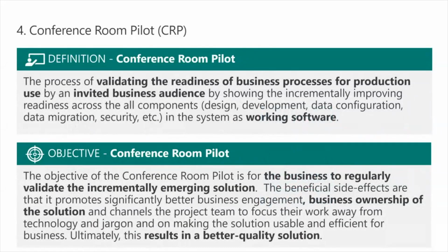Validating by the conference room pilot. This is a key step. And I've seen projects sometimes at the end of the sprint, especially if they're a little bit behind, think, oh, maybe I can skip the conference room pilot. I'll catch up with it in the next sprint. Don't do that. The sprint is not complete until you've done the conference room pilot. The conference room pilot is part of the sprint, and the sprint ends when the conference room pilot is done.